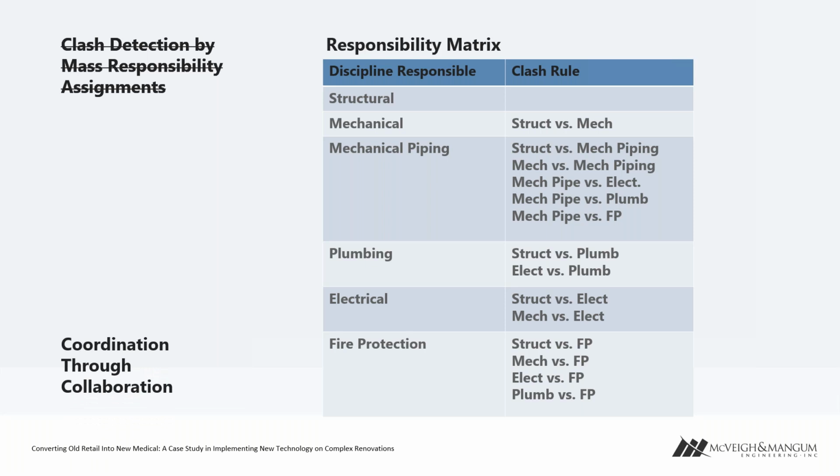So what that means is we had distinct rules of where clashes and groups fell, and they were assigned to a distinct discipline. The reason we did this was we did not want to spend coordination meetings going one by one, seeing a pipe that goes across the clearance of a light 50 different times down a hallway, and somebody sitting there hitting down and seeing the next one. We've all been in those meetings. Those meetings are awful, and there's no reason for it.